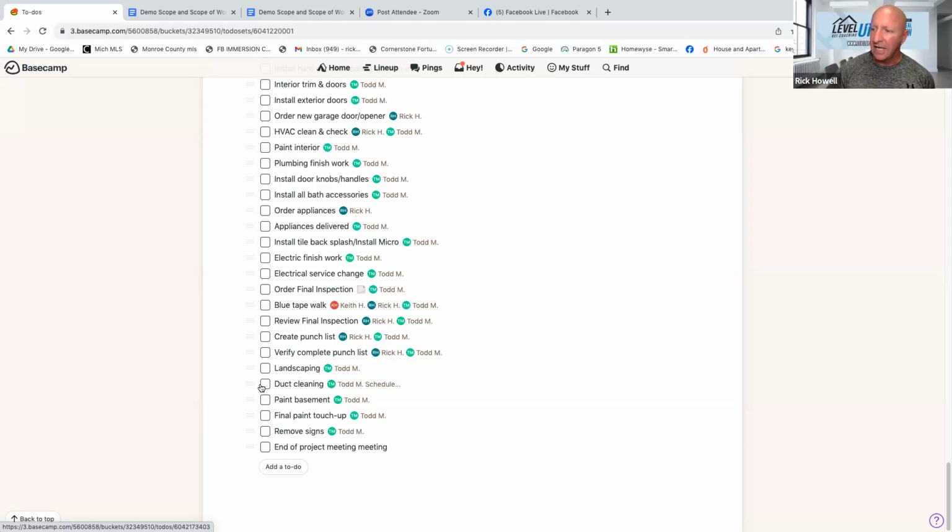If necessary, the duct cleaning will come in last. The duct cleaning will come in very, very last. She wants to be the last one in. Everything she cleans is inside a duct, so cleaning will come through all the way last if that needs to be done.